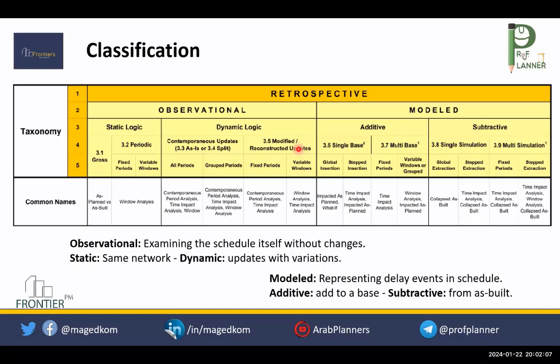Then we can identify who is responsible for those delays. It will not be actual unless the project is completed; otherwise we call it projected or forecasted. The projected completion date is different from the entitlement. Maybe the contractor is entitled only to 3 months, but the project is delayed 6 months. So you need to go into the details of the case and analyze it.